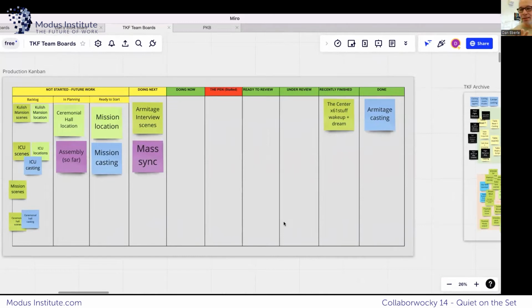So just a quick note on how we operate: we use sprints, but not in the canonical Scrum sense. The way that we define a sprint is we say, okay, we're going to shoot these scenes. We've roughly estimated based on page count and the content of the scenes that it's going to take us, in this case, 3 days. So we'll plan probably a 4-day sprint, and that usually includes some sort of load-in day or other prep day. And then we actually create a plan to deliver.